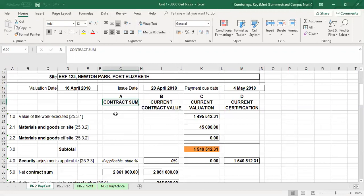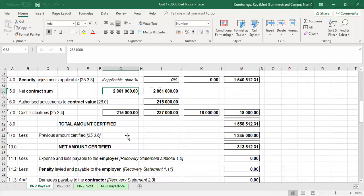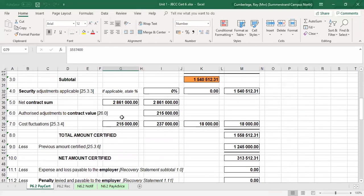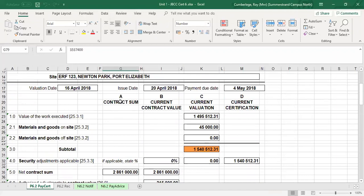If we look at the four columns, you start with column A, which reflects the contract sum. This is based on the actual tender document, the bill of quantities. Your starting point is to look at the net contract sum — the net contract sum excludes VAT and excludes any amount for escalation if it was included in the summary page of the bill of quantities. The quantity surveyor will then estimate the probable cost for escalation based on the net contract sum and the construction period. In this case, the escalation is estimated at 250,000 rand. We add VAT to give the contract sum figure inclusive of VAT.